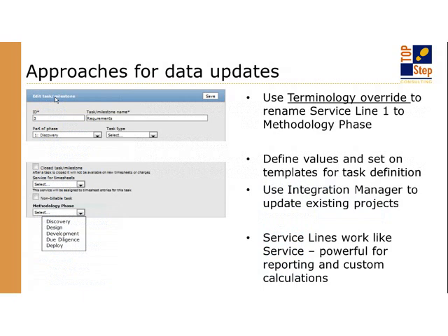So as I set up a task, I have to identify this task is part of this phase. Of course, I'm putting the phase in the part of phase drop down on the project task. But I'm also setting this field. It seems a bit redundant, but what that does is this methodology phase value now is stamped on all time entries. It's stamped on the task during the planned hours.